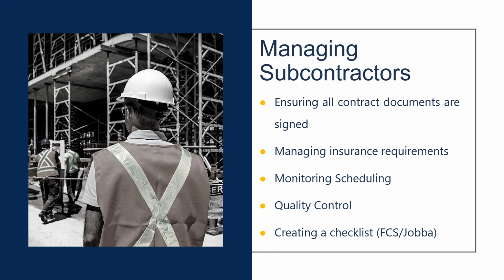Because that's oftentimes what you will get with sub labor: they will get the bare minimum insurance, and then if something happens, guess who's on the hook? You, the roofing prime contractor. So make sure that you have really focused on securing policies, because that helps identify exactly what's what. Same applies, I'm talking primarily about CGL, but also about workers' comp and any other type of policies that you might need on a project.